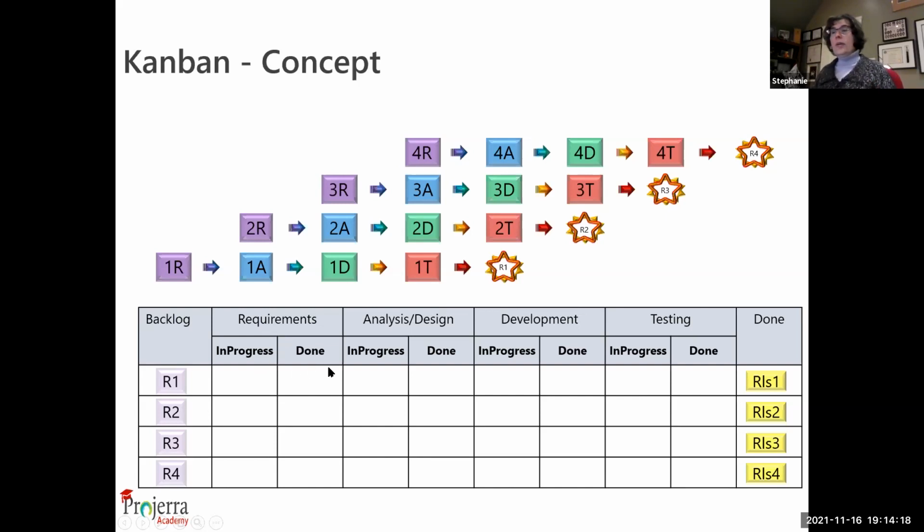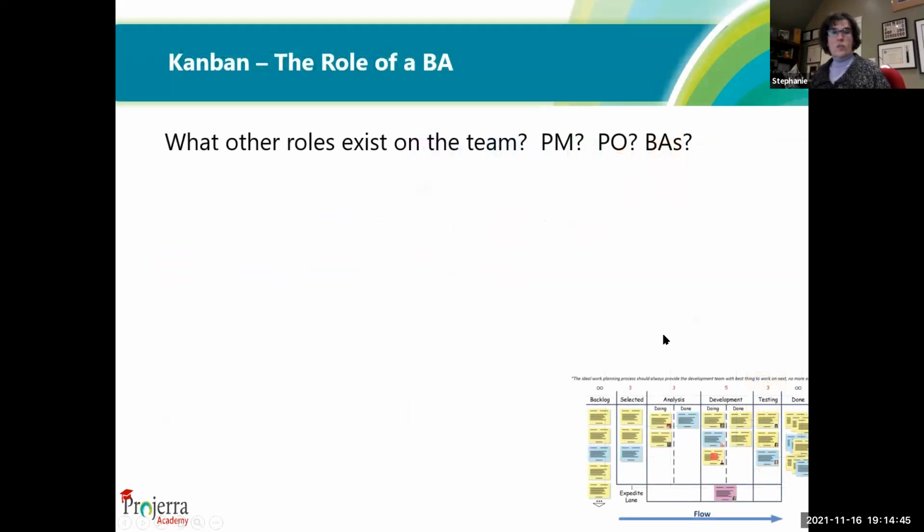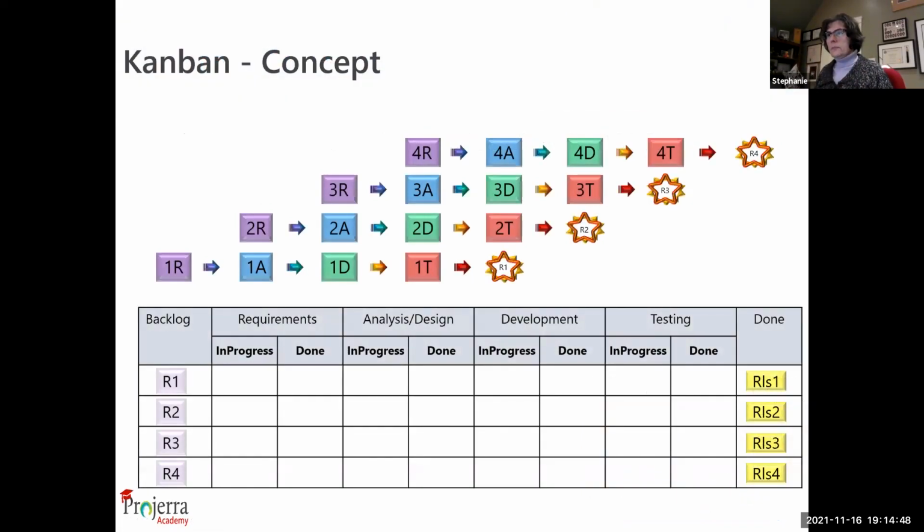So what we ended up doing was I would do requirements in one sprint and get it reviewed. Then that particular requirement would move to the DBA, and the DBA would work on it for a sprint and make sure that the model was correct. And then we'd pass it off to the ETL person, and they'd work on it for a sprint, while the DBA was working on a second model, and I was working on requirements for a third feature. And then we had the report development happening this way. So we sort of chunked it. Each different hop of the Kanban was done by a different function.